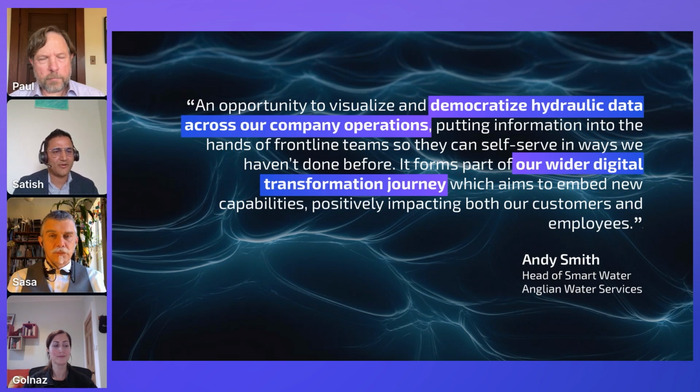But what we are doing right now is, data is an ever changing world, right? Your conditions might go as per your plan, or they might not. That means when you have a changed data set, you don't need to sit on one master plan or the CIP plan for 15 years and implement. You can have a changed capital improvement plan every year. You can still have the same list, but your project ranked 20 can go up to second in the next 6 or 7 months based on the new data.